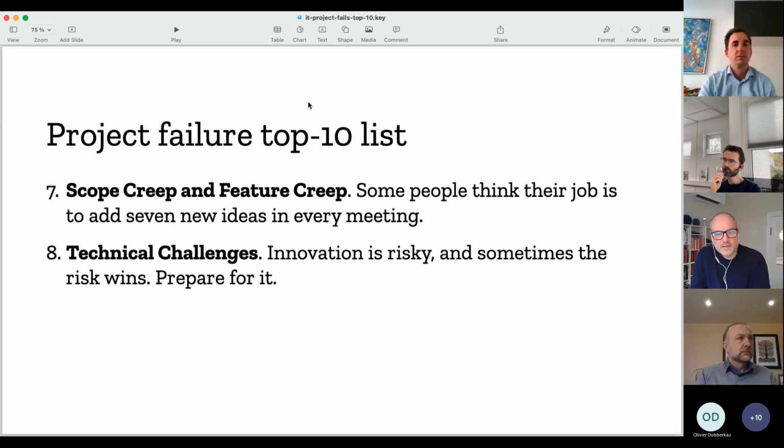So what I usually do is I set a deadline that I call the feature deadline. There's a deadline where we're not going to put any more features into the project. Then we have another deadline where we are not going to start coding more features. And then we also have a deadline for when we're not going to fix more bugs. In order to keep the deadline, we take features out if they are not complete. And then the management, they'll have to live with it, or they have to extend the deadline.